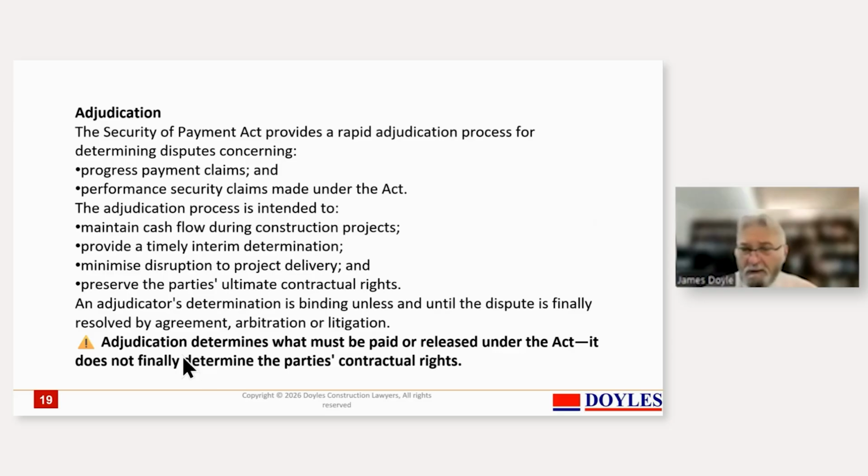One aspect is you've got to understand the approach the courts take to adjudication determinations. On the one hand, they're very tough if the adjudicator fouls things up badly. If he makes a big mistake, he doesn't consider arguments, he doesn't allow people to make the submissions they should be allowed to make, and in his process he commits a mistake which means he hasn't done the duty the Act imposed on him, they will upset it.